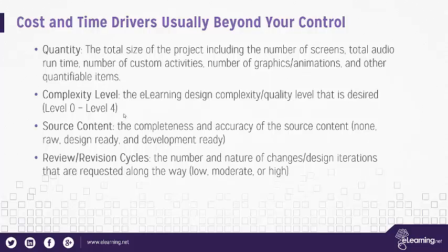There's design ready, which is maybe some rough draft on each slide. You have some notes, some speaker notes. Everything conceptually is in there, but it is not yet ready for prime time. You have to write your scripts and do some lower level effort to get it ready. And then there's what we call development ready, which is a full-on storyboard that has everything you need, all the narrations ready to go. All you have to do is multimedia development, and that's it. So depending on the level of source content you have, you'll need to budget additional time or not for that process.